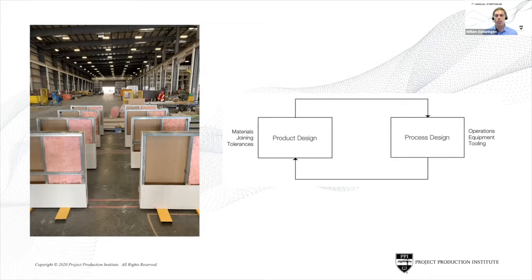And so the delivery model for the standard construction materials requires a different supply chain than traditional construction. We're working through how we develop the supply chain in a way where we're not telling a supplier, hey, I need 200,000 square feet of drywall at one time.